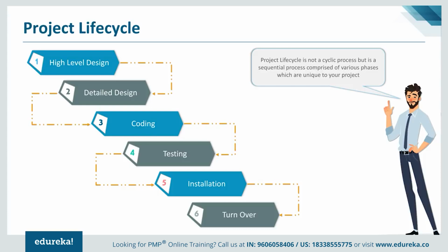Once the initiating activities are in place, the team starts gathering requirements. Based on the requirements, a high level design is created, which is again approved by your customers. Detailed design is created, which is also walked through with your customers. The feedback is taken into consideration. And once it is approved, then you actually start the coding activities. That's where the development work will start for your digital experience project. And once the coding completes, then you start the testing.